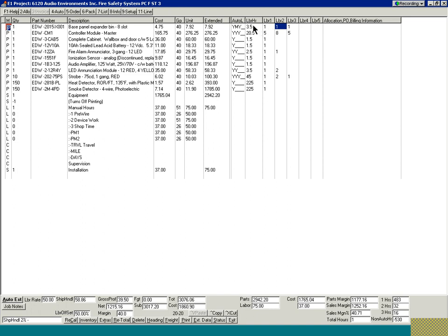Remember, that extra 0.5 that you're seeing here is because we've said that all type 1 labor is 50% up on labor. Notice your little M there indicating that it's been adjusted. Now you notice down here in our assembly we've got our different labor types. Then we've got project management, travel, mileage, and days. And so all we have to do is just go ahead and press this Auto S button.